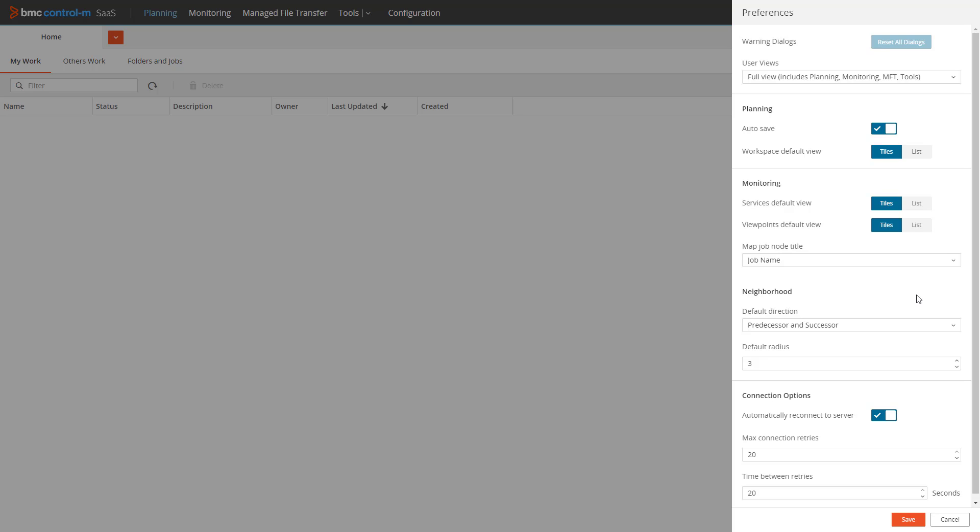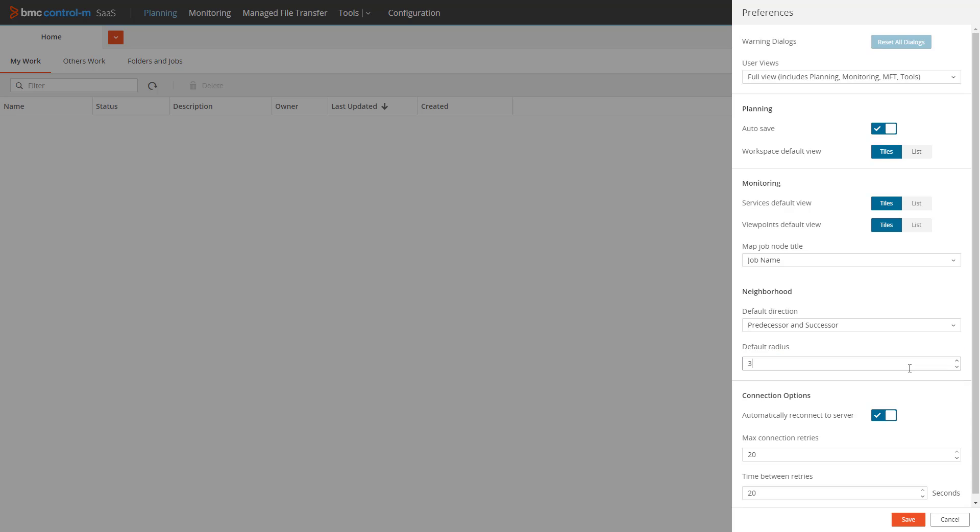The next section is neighborhood, and it relates to the default behavior when using the neighborhood option to display the successor and or predecessor jobs for a specific job. The default direction option allows you to choose if you want to default to show both predecessor and successor, only predecessor, or only successor. The default radius option sets the default number of levels that will be shown.